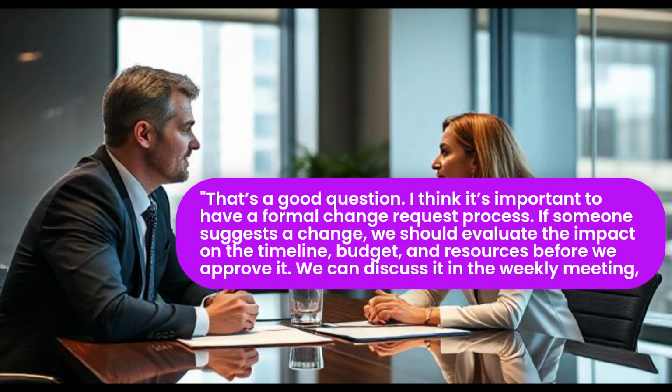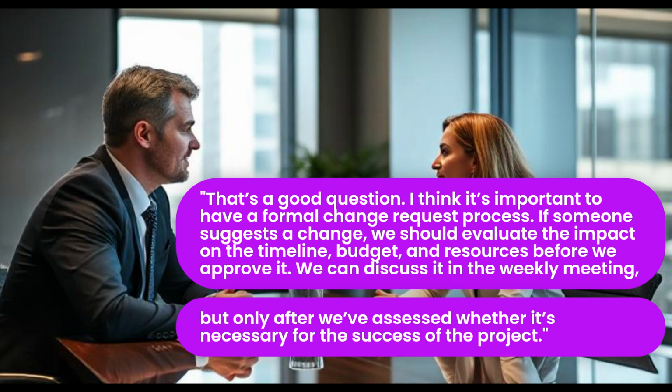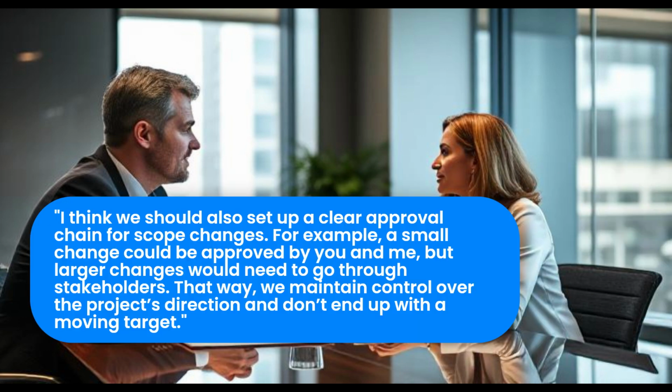That's a good question. I think it's important to have a formal change request process. If someone suggests a change, we should evaluate the impact on the timeline, budget, and resources before we approve it. We can discuss it in the weekly meeting, but only after we've assessed whether it's necessary for the success of the project.